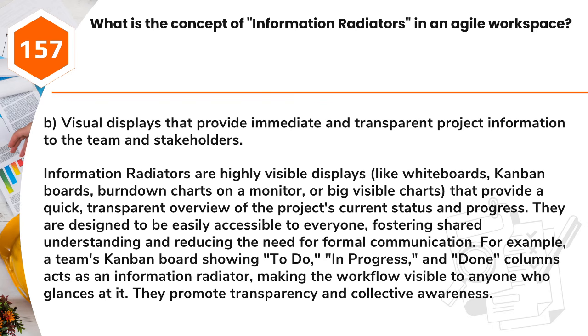For example, a team's Kanban board showing "to do," "in progress," and "done" columns acts as an information radiator, making the workflow visible to anyone who glances at it. They promote transparency and collective awareness.